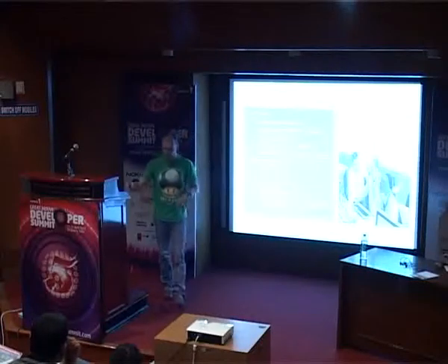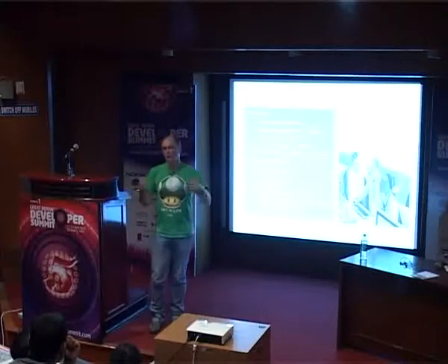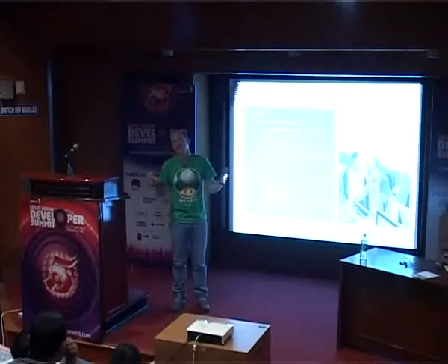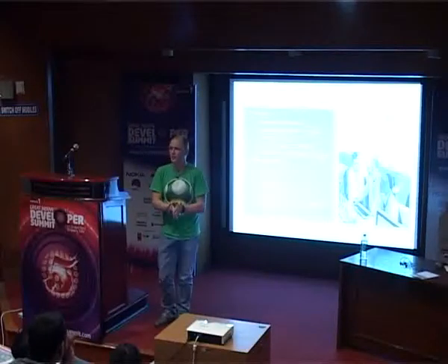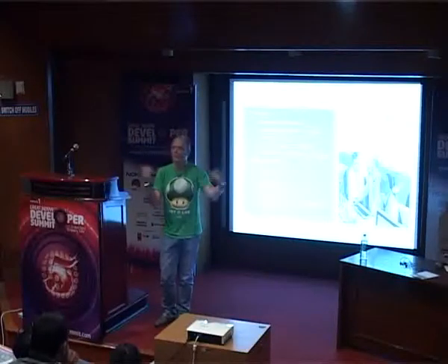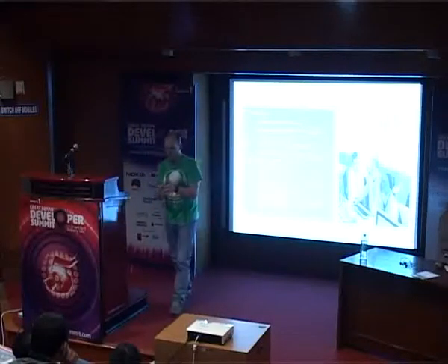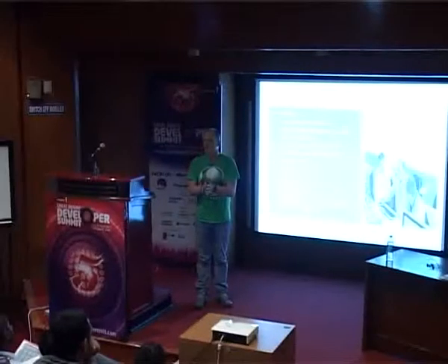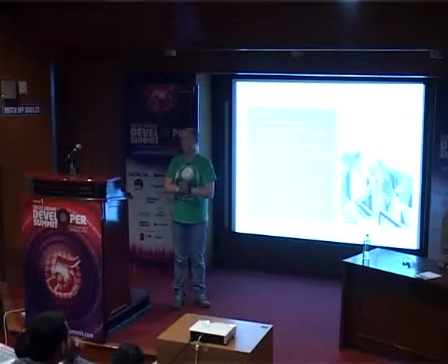And again, usually due to the fact that these projects, or usually programs with a lot of projects in them, last very long, requirements change. Actually, requirements change in any project that you might have. And they will change on average between 20 and 25% in a project. Statistically proven, so it can be more or less. But anyway, requirements change, and especially if you're running a very complex project with an enormous amount of requirements and a lot of technical requirements as well, if your requirements change, that makes it very, very hard.